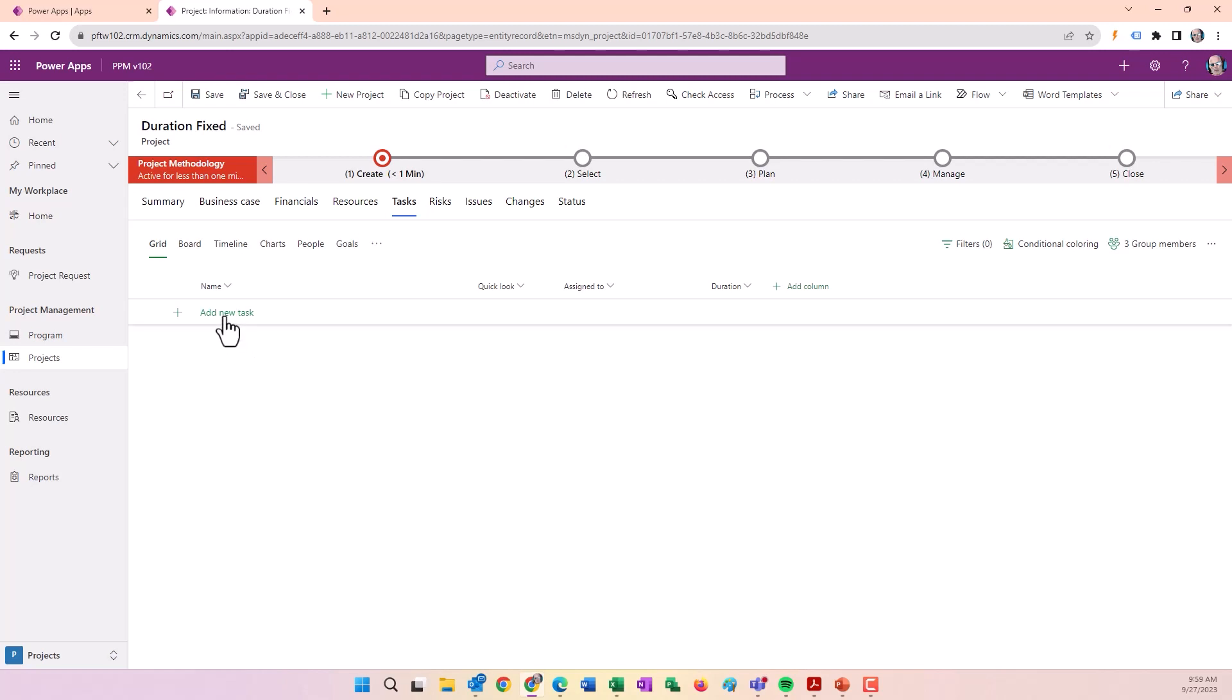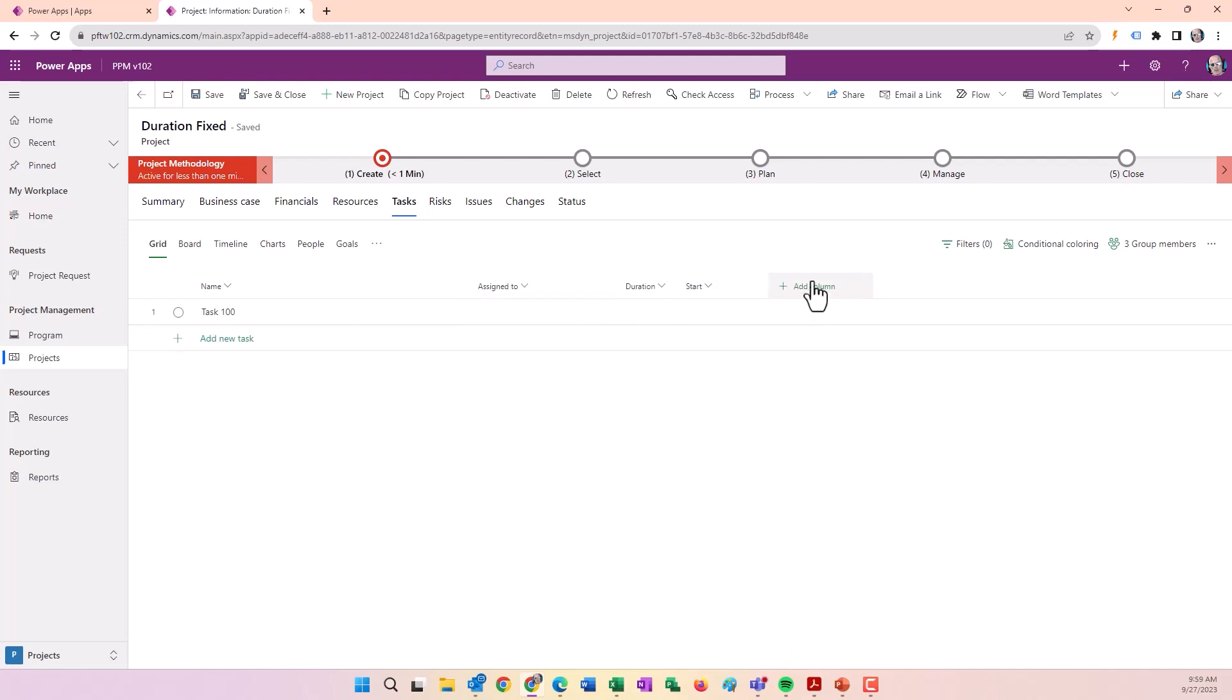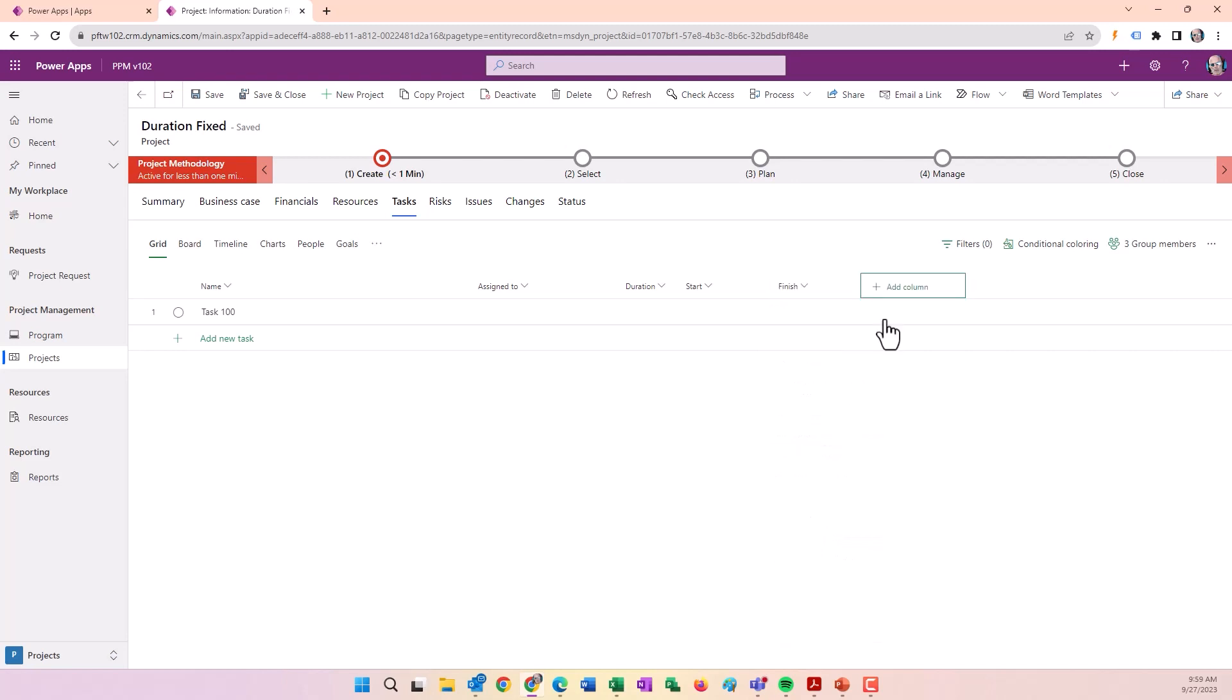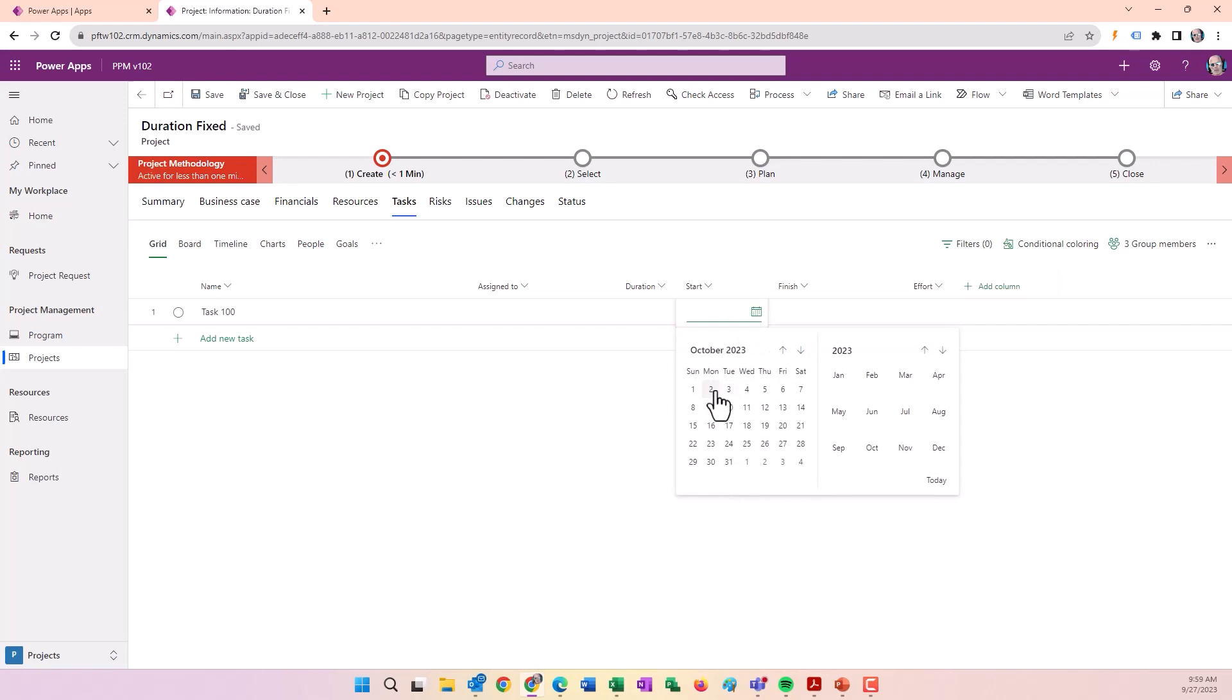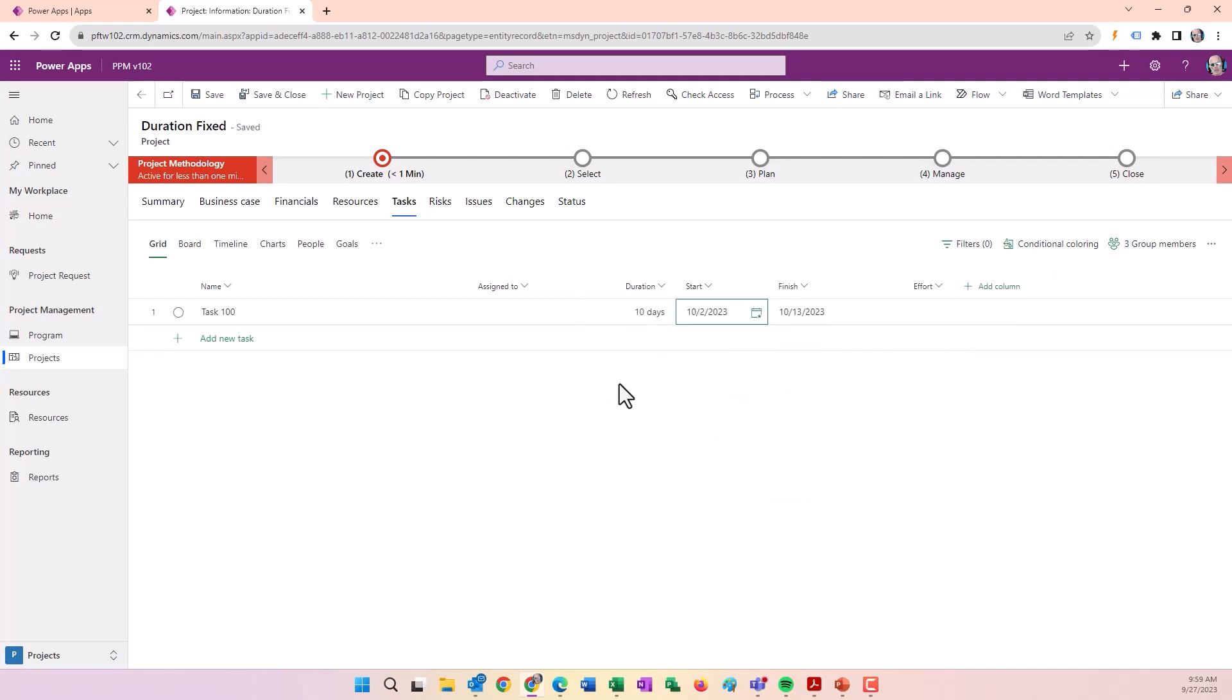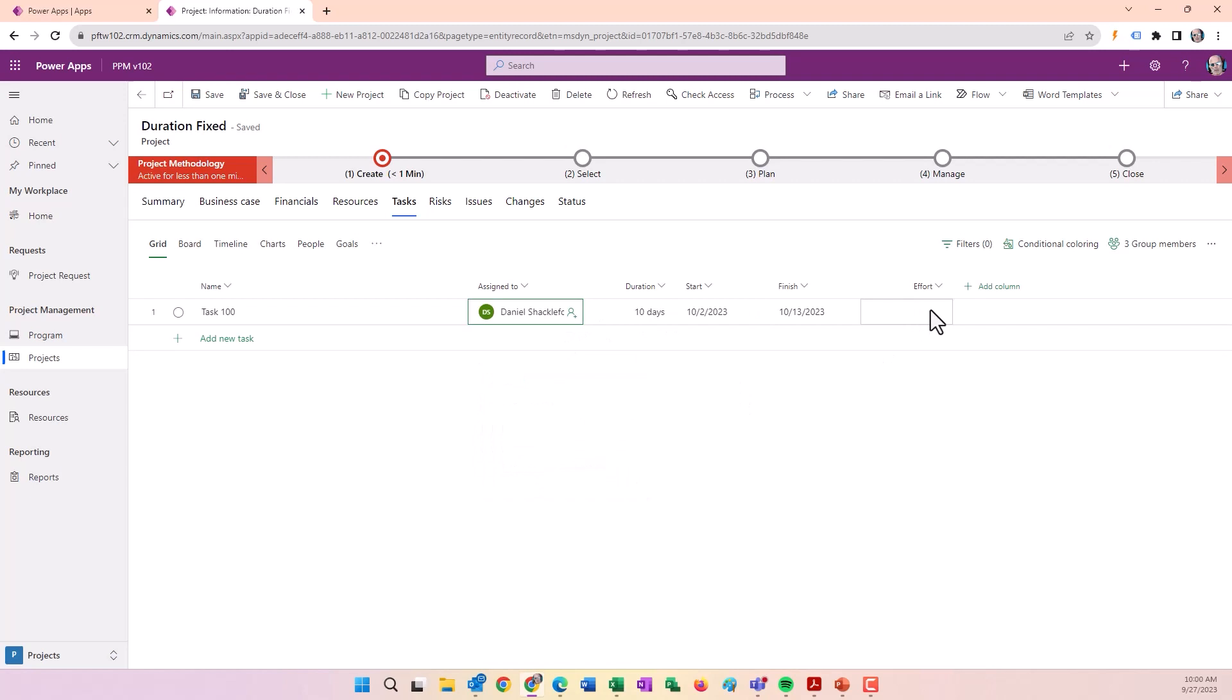Create Task 100. It's Fixed Duration, so typically we like to estimate that first. I'll make the start date October 2nd and make it a 10-day duration. Once I assign a resource, the effort will be calculated.